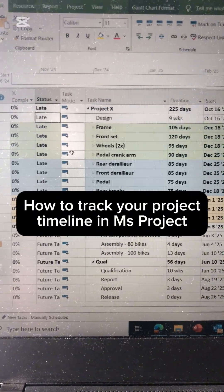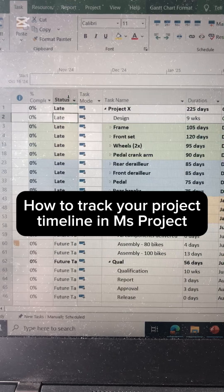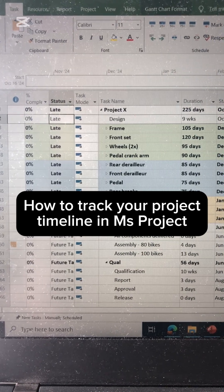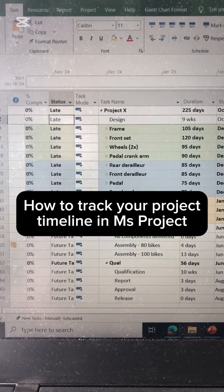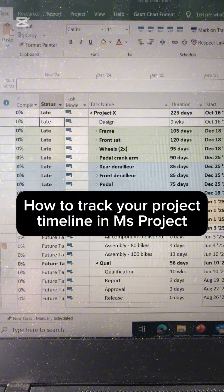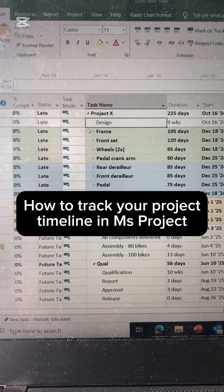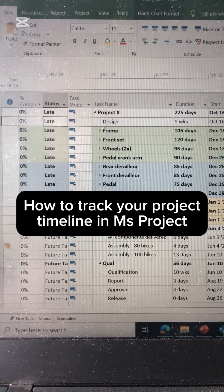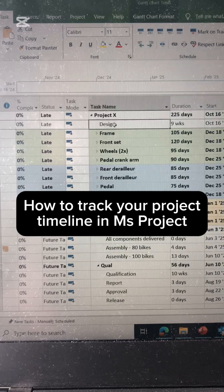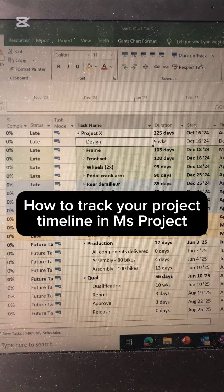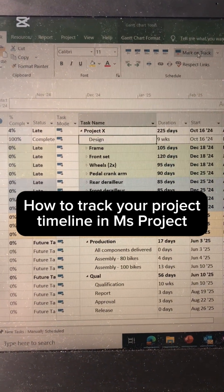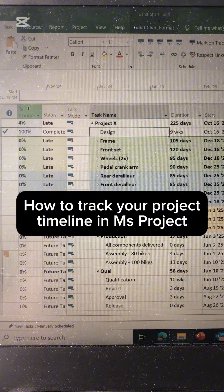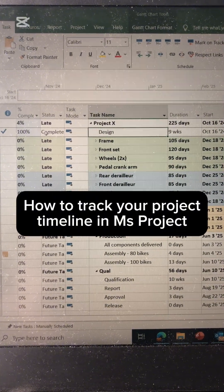On those two columns, the status column will point out everything that's delayed in your timeline. For example, in this case I have an activity called 'Design' — I'm going to check if it's complete or not. It's completed, so I mark it on track, and it marks a hundred percent.